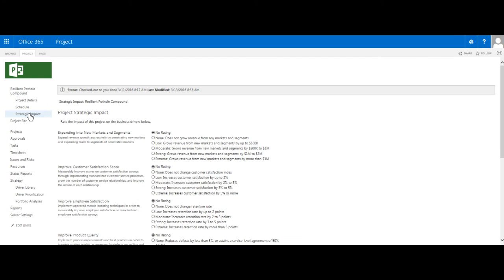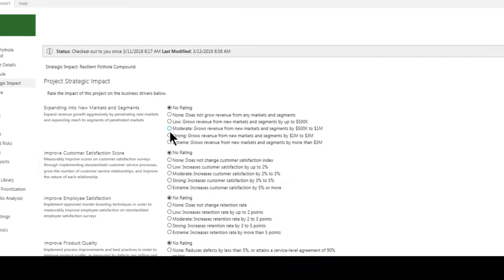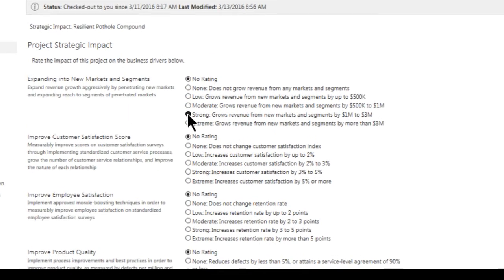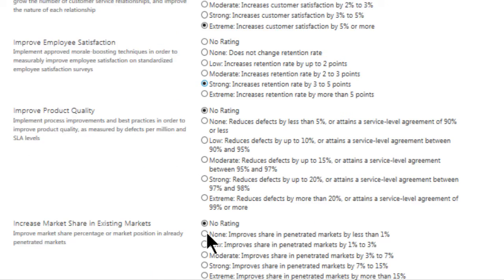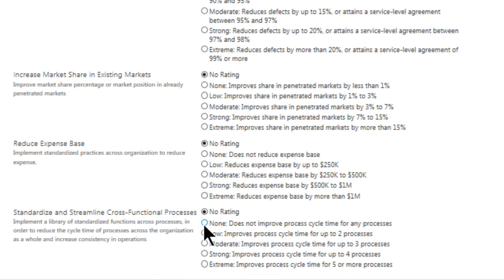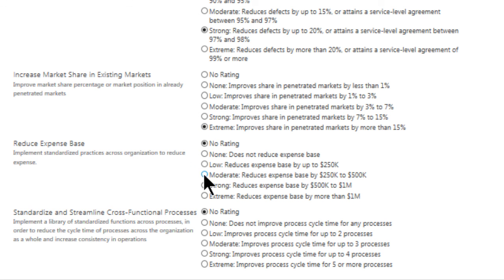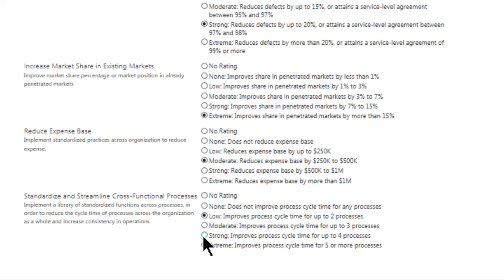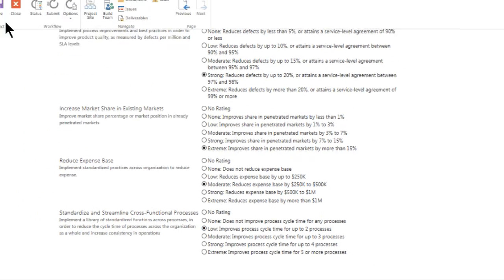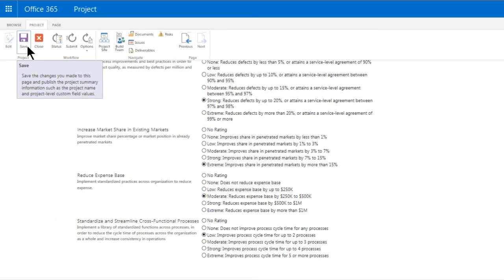Here we evaluate a proposed project against the strategic business drivers that have been defined. Expanding it to new markets and segments, improved customer satisfaction score, etc. We will give a ranking for each of our drivers. This will help us make a determination later in the selection phase when we have to decide which projects we are going to commit to. Please refer to the portfolio analysis video that I've created for more details on this and how PPM can support your selection phase. I'm ready now. I've made my selections and I will save them.